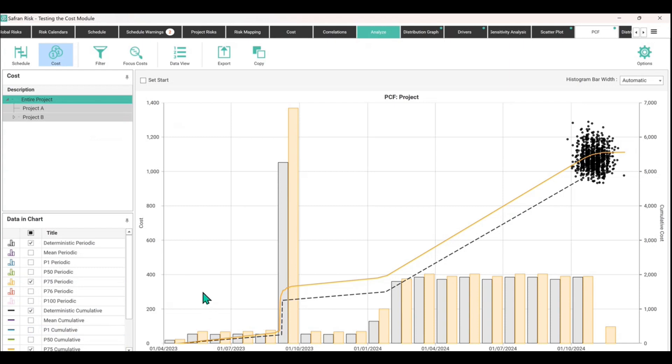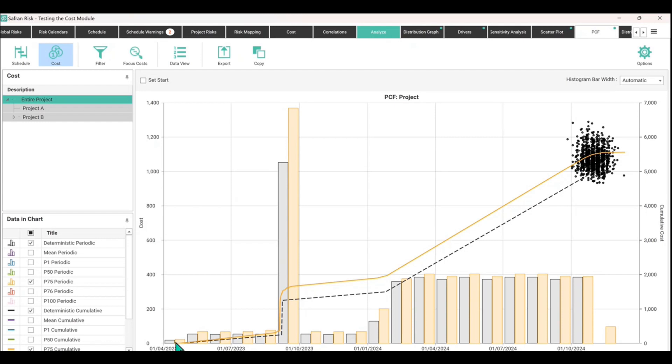At the moment I've got it toggled so you can see I've got lots of different focus values, but I'm only really interested in say the P75. So I'm comparing the gray bar versus the kind of orange amber colored bar here. This is showing me that if I want 75% confidence in my plan and what I am communicating to other people, then I could be reasonably assured that we're going to overspend this particular period here.